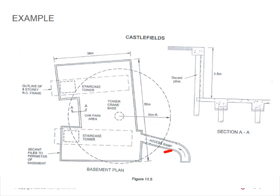The method statement includes a description of works at the top, followed by a sequence section listing procedures that must be carried out prior to excavation. Then there's a resources section covering supervision, labor, and plant. Health and safety is combined into this method statement, listing significant hazards and control measures, with PPE requirements at the bottom.